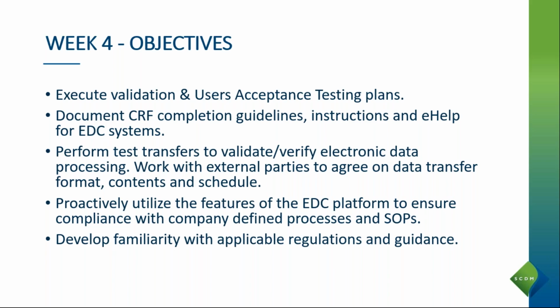Now, we also do a test transfer to validate and verify the electronic data. If we have to do some transfer of data, for example, we are receiving lab data that has to be implemented within the eCRF, this also has to be tested. If we are working with external parties, we need to agree on when the transfer is done, what the contents are, what the format is, and what the schedule is, to make sure that this external data can be loaded within an eCRF without any problem. That has to be tested also.